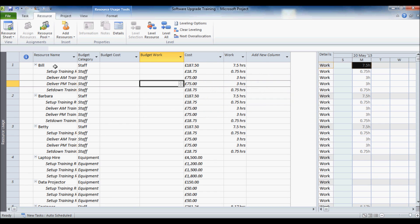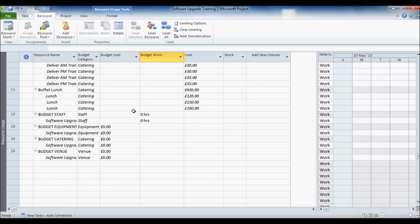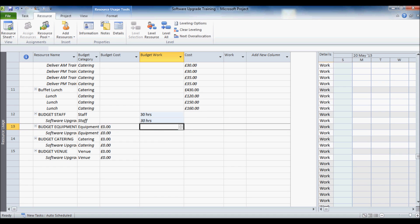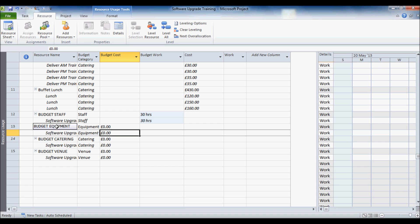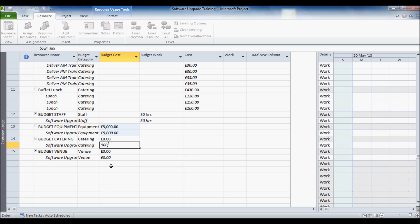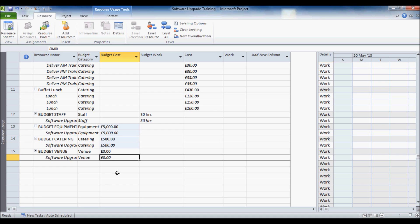Now we have got all your different resources. And down at the bottom here we have also got our budget resources. Now what I am going to do is actually put in my budget for these different categories here. So for example for the staff, because it is a work resource I have got to put it in as hours. So I will say 30 hours is what I am budgeting for. Equipment I am going to put down 5,000. So cost resource I can put in a monetary figure. For the catering I am budgeting for 500. For the venue I am budgeting for 600.